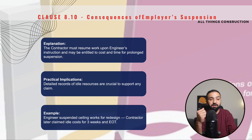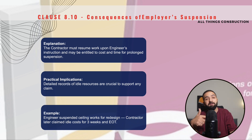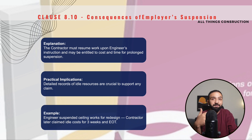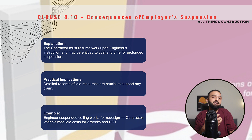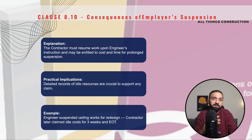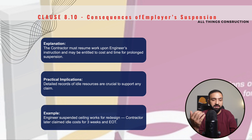Taking the same ceiling example — the ceiling works got suspended, we were suspended for three weeks, and we put in a claim. This claim will normally get accepted if we actually suffered losses as a result of the suspension.